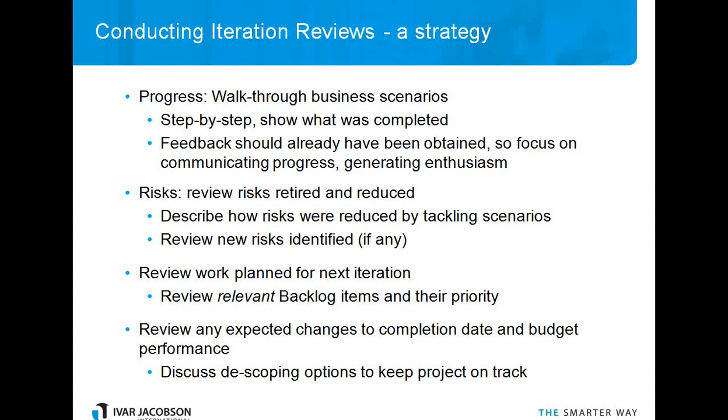So here's a bit of an outline on how to conduct the iteration review, what you should schedule, and you could use this as kind of the agenda for the iteration review. So first of all, walk through what business scenarios you've covered. You probably, until you get to the end of the project, will have gaps in business scenarios, but you can walk through which ones you've covered, what pieces you've implemented, and what pieces remain to be done. So step by step, showing what was completed is often a useful thing, at least among the key things that would be critical to the stakeholders.